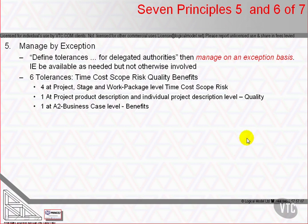Variation includes actual or even suspected or outlooked status. Third, Management by Exception requires that we establish an assurance regime to give each management level confidence that results and reports from below are an accurate match to reality. Fourth, Management by Exception imposes an escalation process when an actual or possible variation is beyond the tolerance limit, and so triggers the escalation of an exception to the next higher level of management for a decision on how to respond to the tolerance threat.